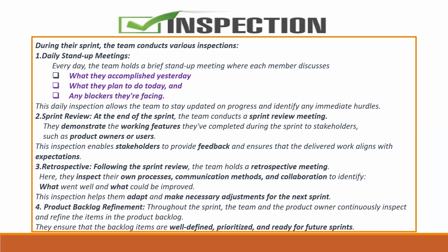In the daily stand-up meeting, everyone in the team has to attend, where each member discusses what they did yesterday, what they have planned to do today, and whether there are any blockers they are facing. This daily inspection allows the team to stay up to date on the progress and identify any immediate hurdles.